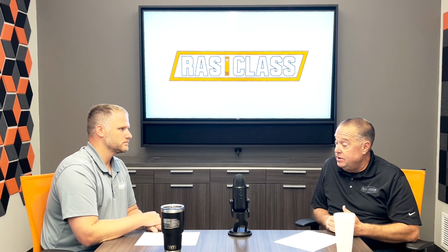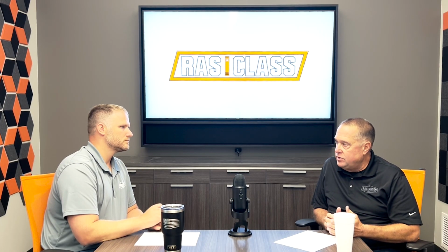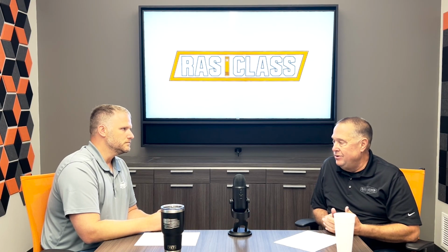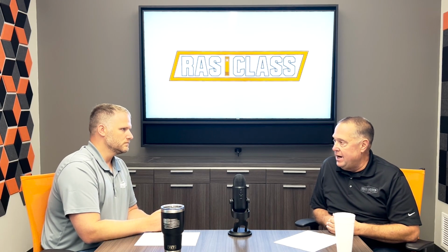One thing I did miss is there's an advance notice that has to be filled out for every boiler that goes in, whether it be brand new or used. Most states require that to be a 10-day advance notice. In an emergency, they will waive that. So I'll work with them. It's usually the responsibility of the owner to do that, but it takes me a minute to fill it out because I'm familiar with it. So I'll fill that out for them.